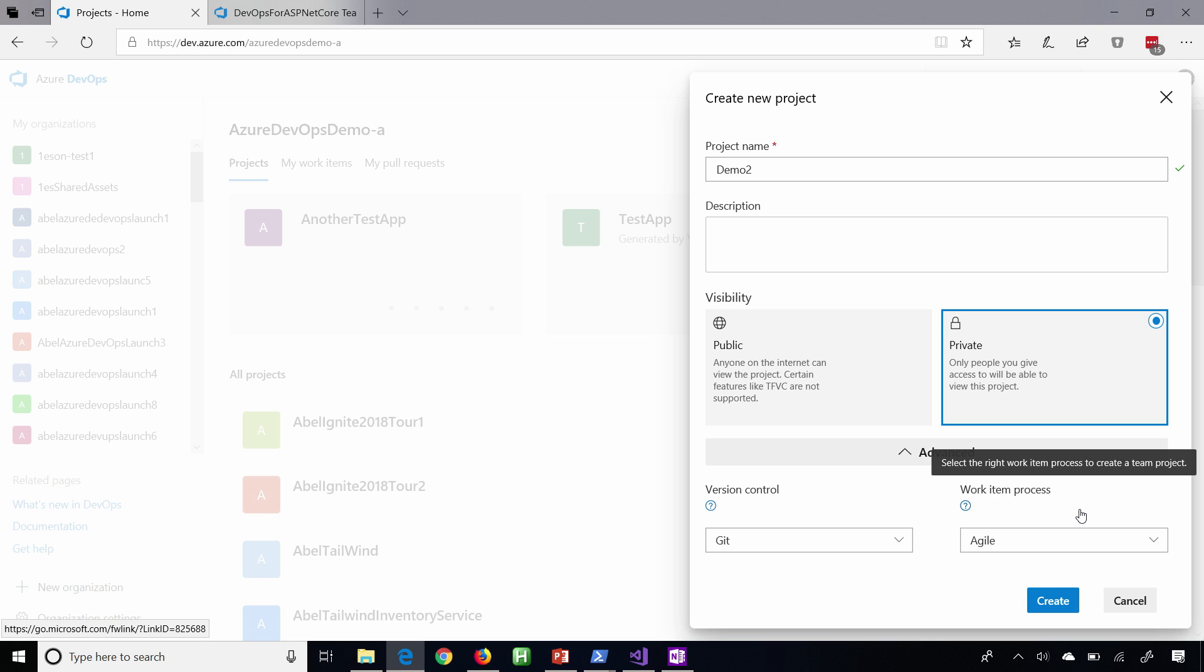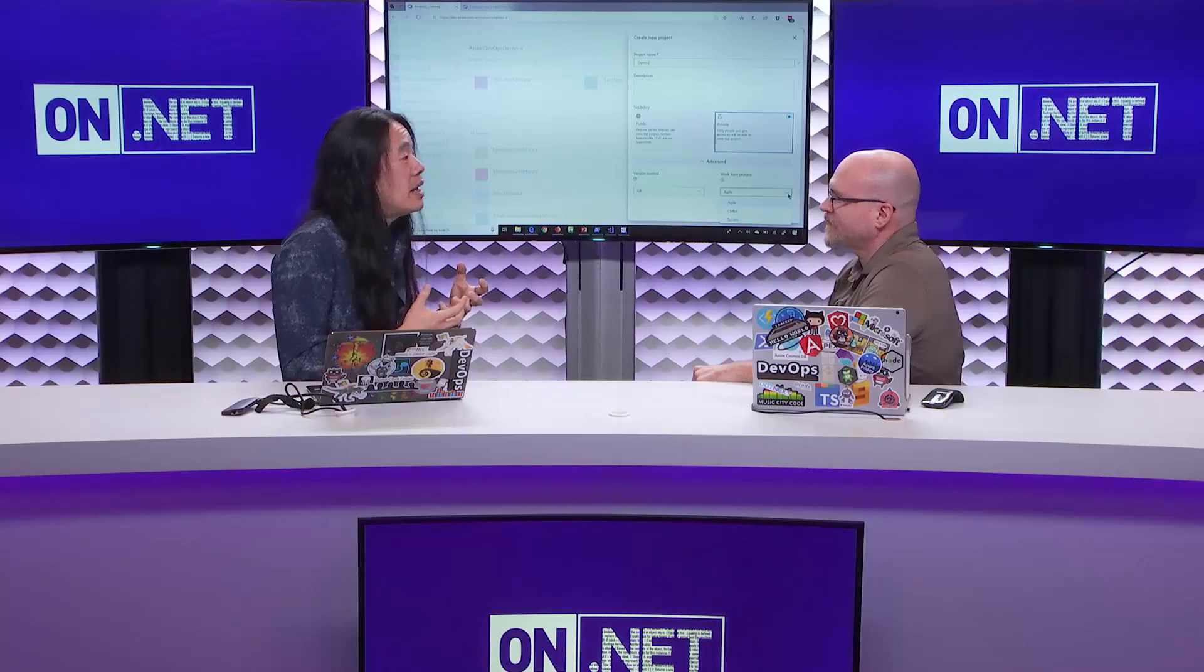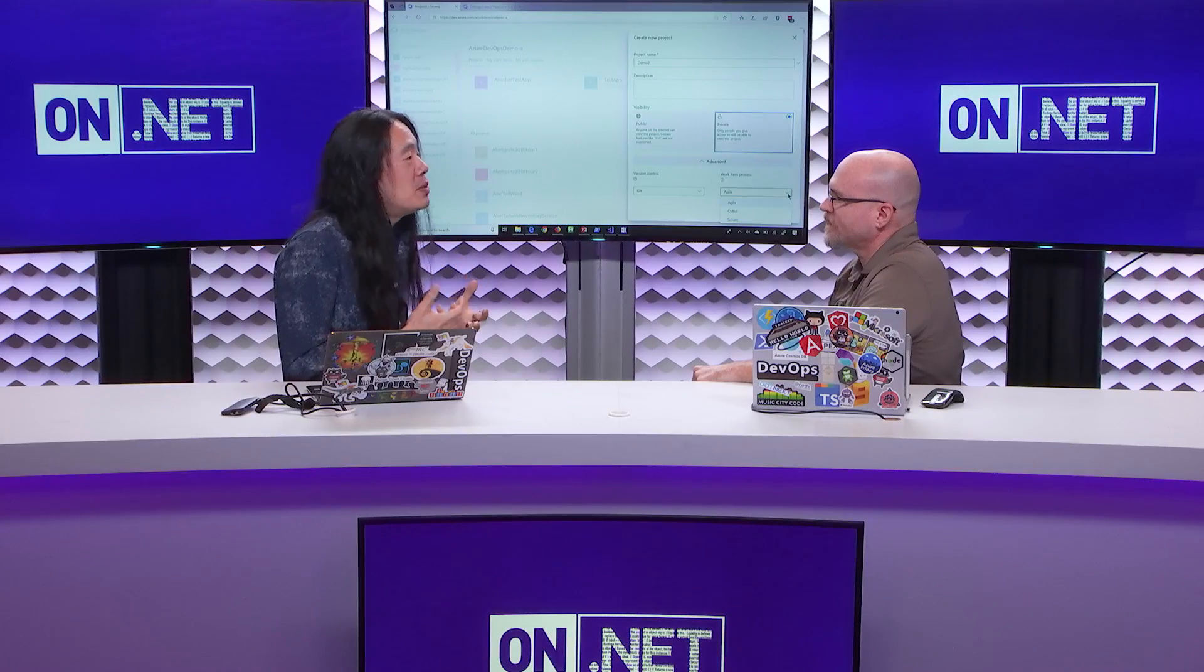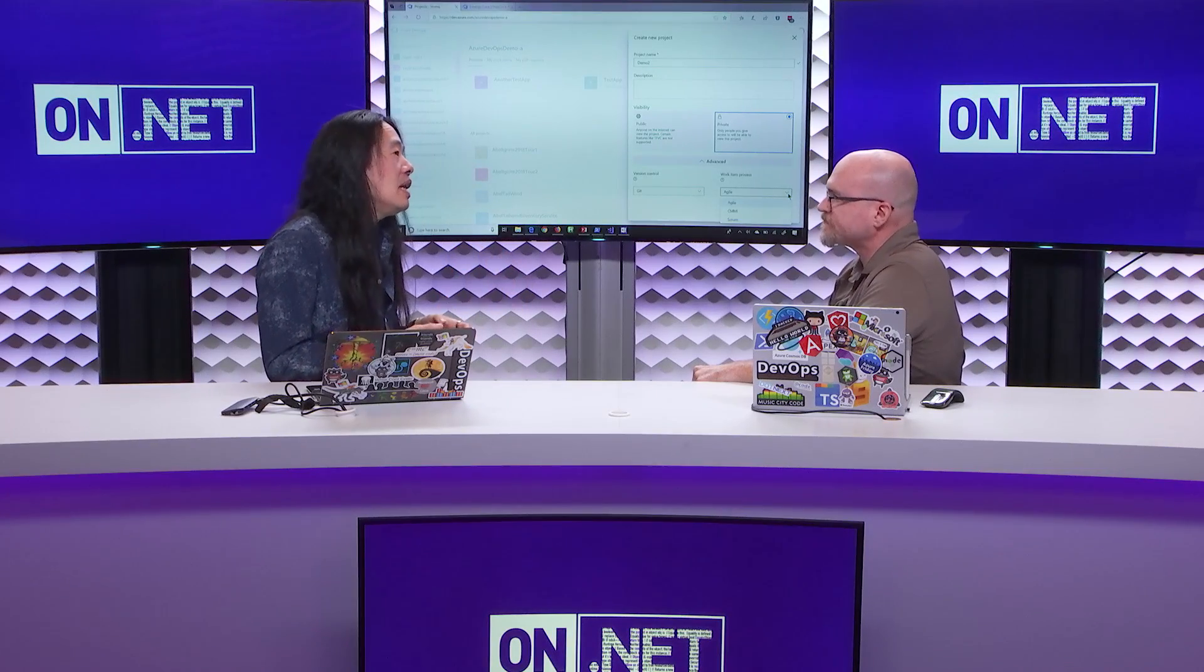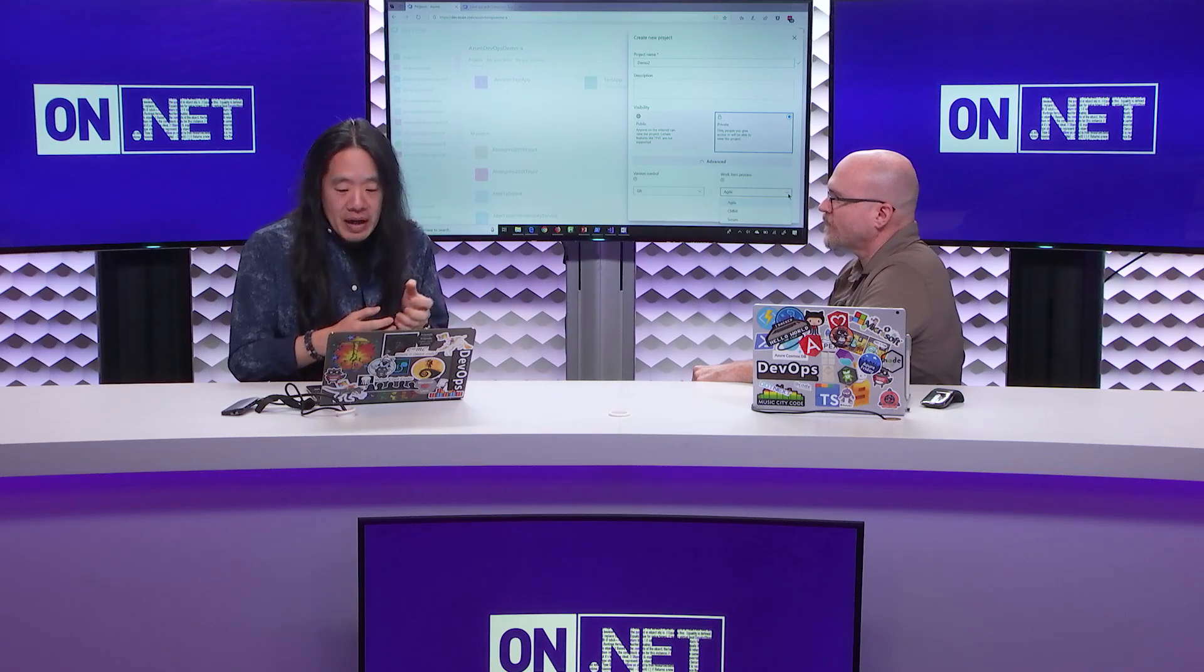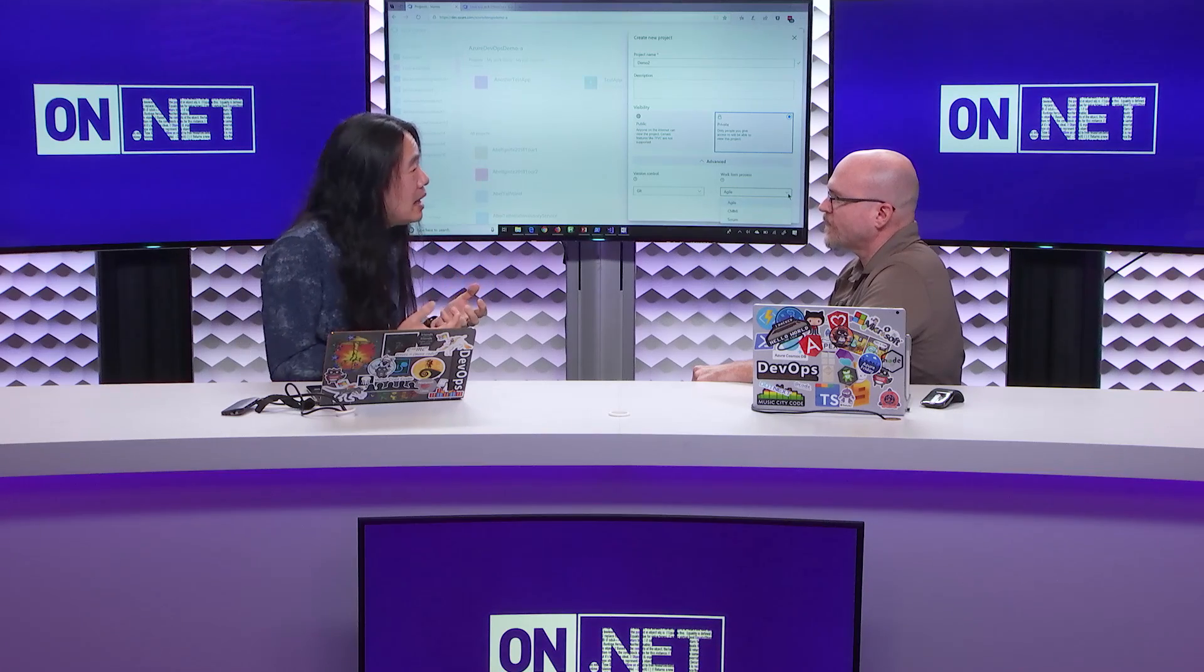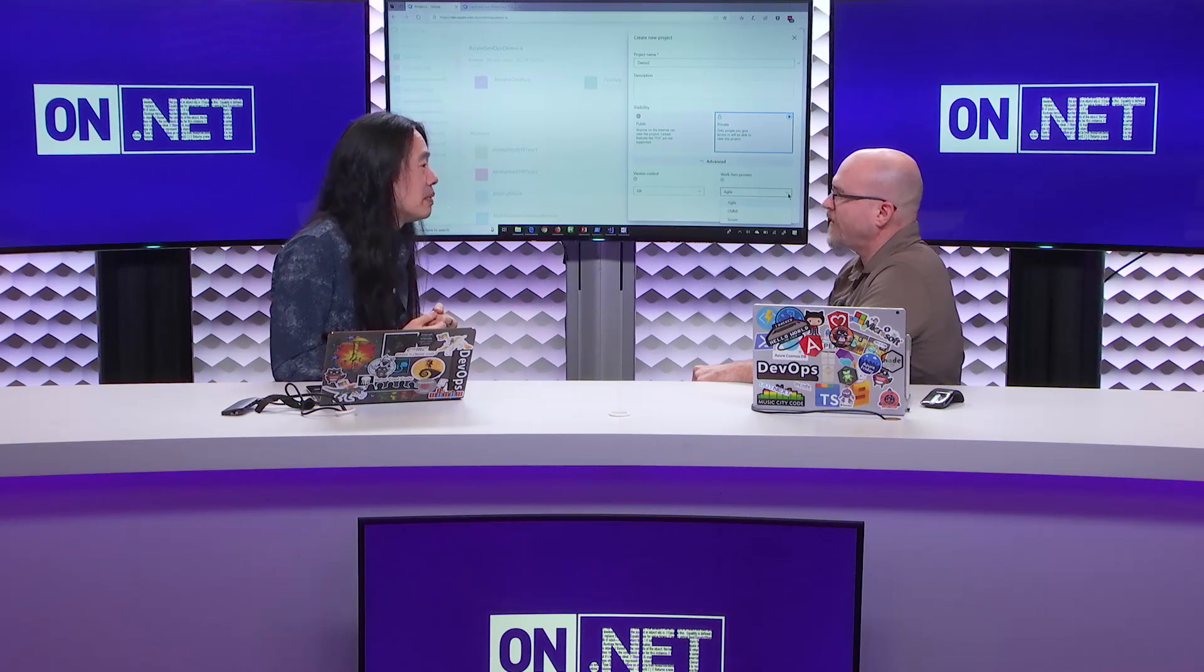And before we create it, let's open up the Advanced window. And you can see you have choices for the version control system that you want to use and also the work item process. Okay. So depending on the process that you choose, that will change the work items a little bit. So inside of Agile, if I choose Agile, what you'll end up getting is you'll be getting things like user stories and impediments and bugs and things like that and tasks and epics and so on and so forth. I don't want any impediments so I wouldn't choose that, right? If you use Scrum, then all of a sudden you start getting work items that are Scrum terms, like you have backlog items instead of a user story. And the states will be a little bit different. And then finally with CMMI, then you just get another set of work items as well.